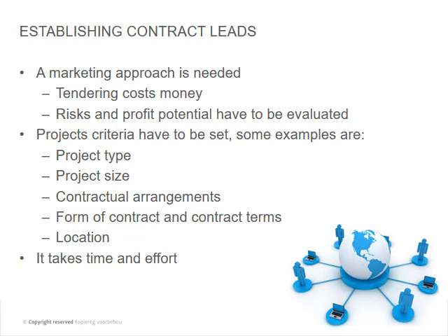Then risk and profit potential have to be evaluated. For instance, now that Orchestals, that's a building project. If you're a civil contractor and you have too much work anyway, then you consider, is it maybe too high risk to actually spend time on that one? Let's rather wait for another big civil project, which suits us a little bit better.